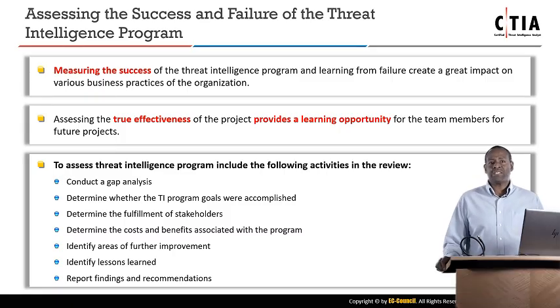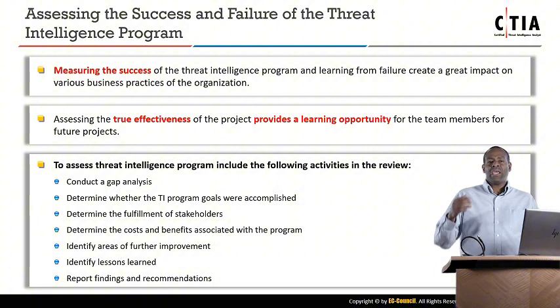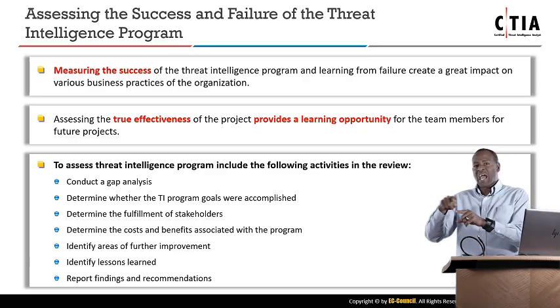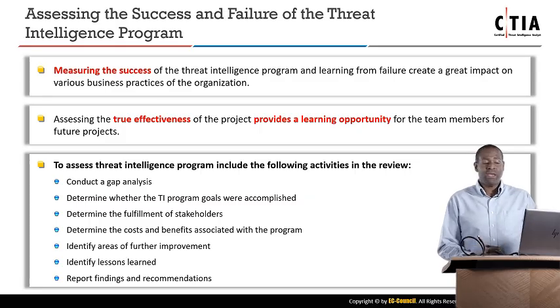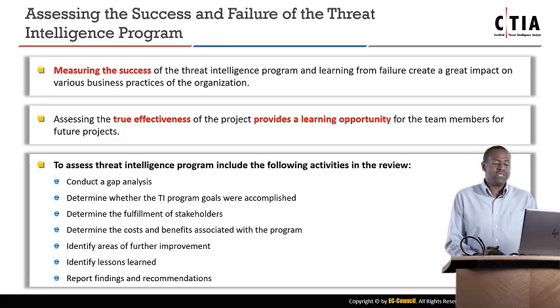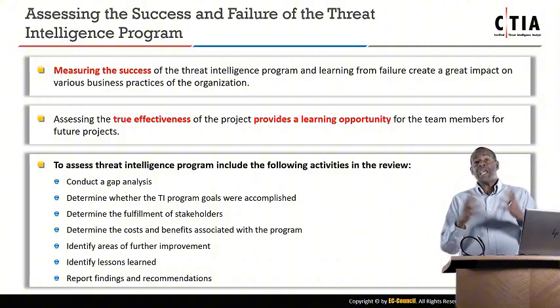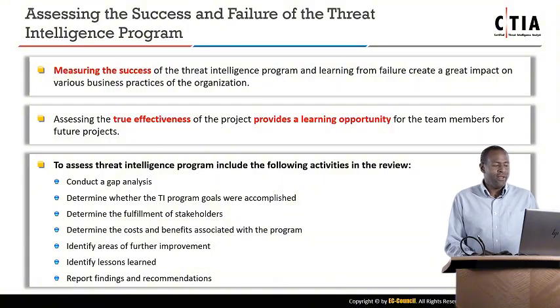So we take the successes. For instance, we can look at the incidences of intrusions, of malware that have actually caused problems on our systems. We look at the data from before the program to after the program. And if we see a huge decrease, then that will be a success. If we see the same number or more, then perhaps we're looking at a failure.